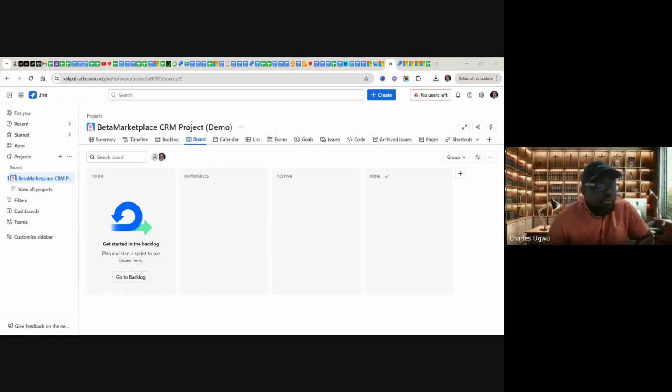So once we've done the sprint review, the sprint review brings the end of the sprint. If there is any bug, you can't do anything here. Everything you discovered, even if you didn't finish the work, you move it to the next sprint.